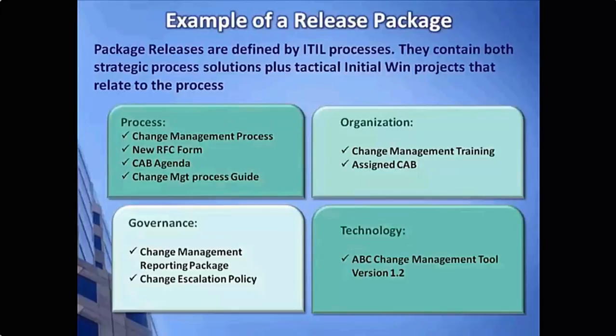From a technology standpoint, at the same time, we are also releasing a change management tool, or maybe it's a new version of a tool that you already had, but either way a tool would be part of this release. On the organization side, we're going to include and roll out some change management training, and we're also going to roll out our CAB by having assigned CAB members and having trained them on their responsibilities. On the governance side, we may include a change management reporting package and an escalation policy. So all the items shown on this slide could be packaged together into a single release for our change management solution, just as an example.